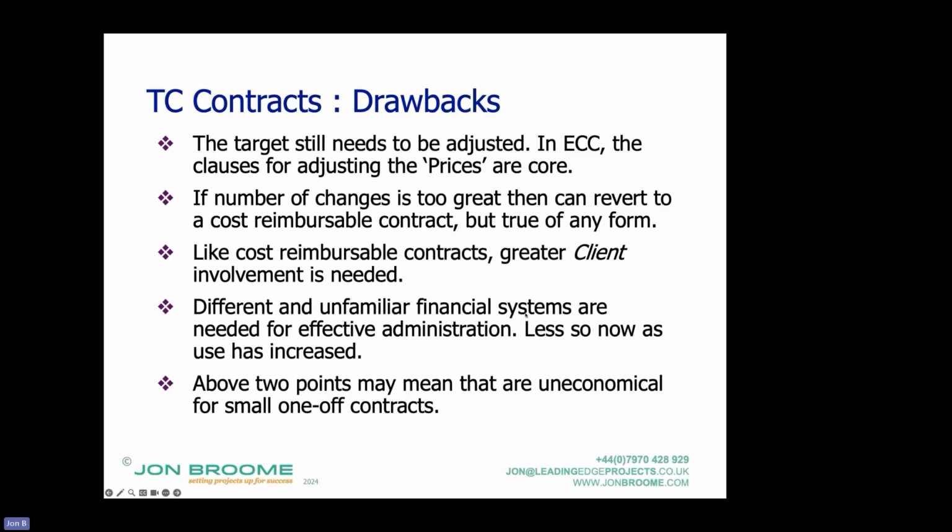The other aspect where greater client side involvement is needed is the administration of open book accounting. This morning I was watching a webinar on auditing. I think it should go back further than that, and actually fair play, he did. But you need to get up to speed on the financial systems. The contractor needs to have good financial systems as what he called the first line of defense. Do the contractor systems work well? Are they up to it?